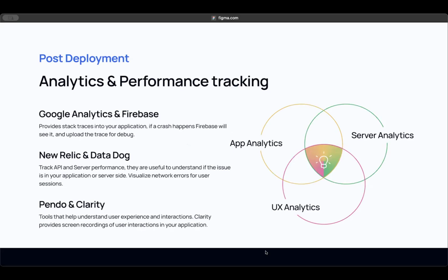Make a fix, you push it through your development process, it goes through QA, it goes through deployment, it gets automatically deployed to the App Store, and within, you know, 6 to 8 hours, you have a fix out in production. For us with iOS apps, it takes around 6 to 8 hours because Apple needs to approve the release. But with web, it could be instant. Within 20 minutes, you're going to have a release out and your website's going to be back up and running.